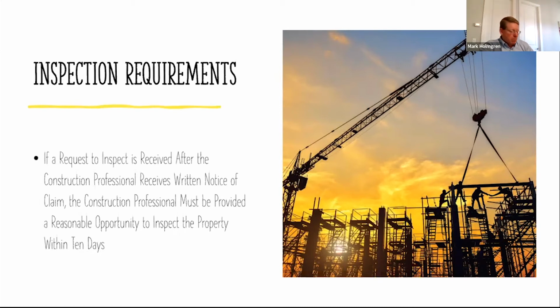A few years ago, they changed the statute to broaden who it encompasses. It used to be that this would only apply to the builder, the developer and the general contractor specifically. They were the ones who had the right to notice and an opportunity to inspect and repair. They've broadened it, though, to include professionals like architects and engineers, and the developer and general contractor now statutorily can drag subcontractors into this process as well.